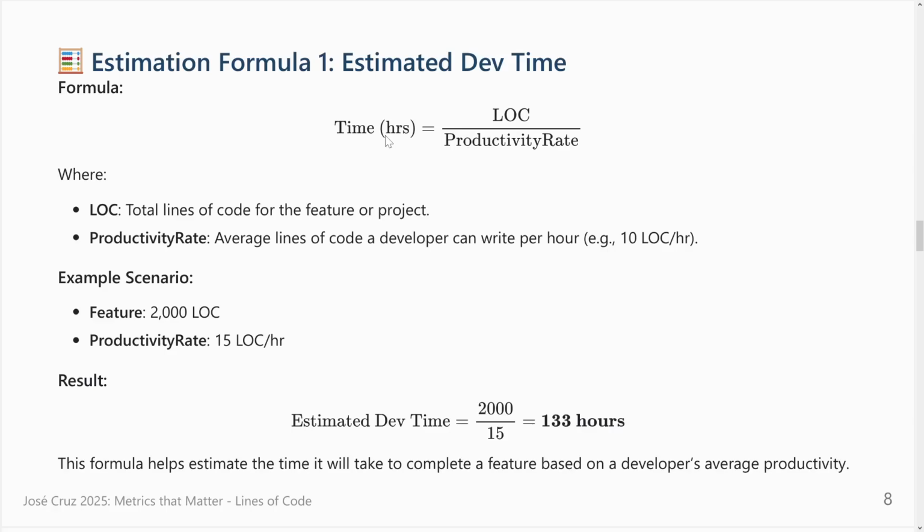On average, one developer of this team develops this number of lines. We expect 5,000 lines because in previous projects I worked on, it was around this, or between 4 and 6,000, and I expect this time to develop this. Let's say you have 2,000 divided by 15 lines per hour. So you need this many hours. Now we understand that you'll need almost 1 month of one developer to develop this feature, and it is as good as any other.